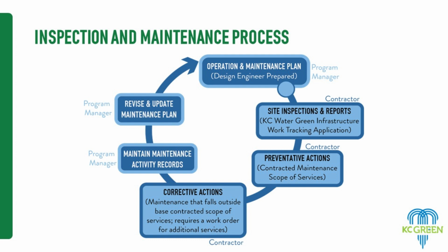Most of your work should fall under the routine maintenance tasks. That's what you're working through regularly. But there will come times where there's a larger issue at hand that's outside of your scope, and that's what that allowance money is for. That's what we want you to make us aware of. We know there's a lot of these sites that need plant replacements, and that's a big part of what that allowance is for.